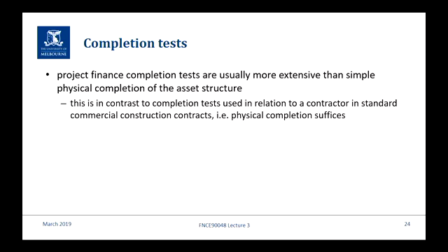So they send in the quantity surveyor, who goes into apartment 1, looks around, yep, good. Goes into apartment 2, he's got a big ring of keys. Goes into apartment 3, 4, and every apartment, rings up the bank and says it's physically complete, and that is the trigger for non-recourse in those types of construction contracts.